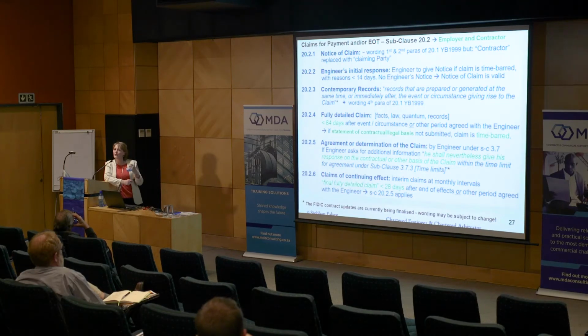And because you guys, I'm sure, have no problem understanding what's meant by contemporary records, we thought it was necessary to define for the rest of the world what we mean by contemporary records, which are records generated at the time whatever it's recording is actually happening. So for those of you in the industry of claims consultancy, just be aware that retrospective programs or records won't fall under the concept of contemporary records.